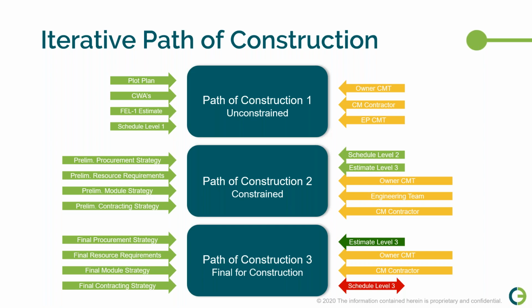So you're going to have a look at what we refer to as soft and hard constraints, where the soft ones are the things that I can change, sometimes with more effort by resequencing, or sometimes with the liberal application of additional money. And the hard constraints are the things you can't change. Even with the best will in the world, there's nothing you can do, and the date is the date. So you look at each constraint that's going to impact your ideal path of construction. Invite criticism. Let everybody present their input about what could impede the plan. And then separate them into those soft and hard constraints.